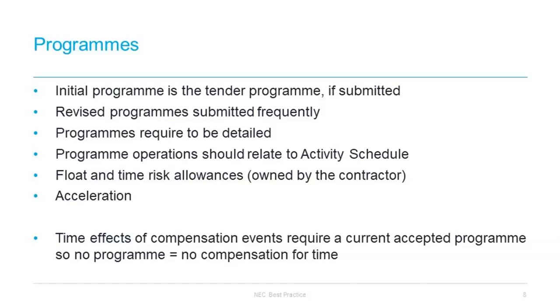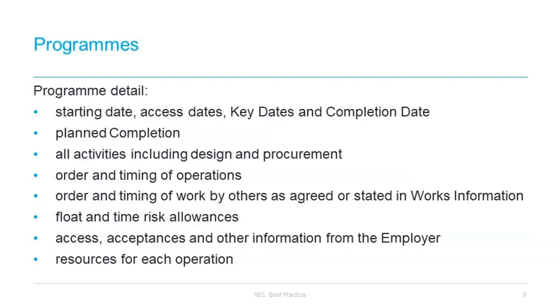And that's why we say recognising what your contract looks like and whether acceleration is at the contractor's option or not is quite important. And if you're a contractor, do not accelerate until the quotations that you've submitted have been accepted, or say no if you do not have the resources or do not have the ability to accelerate at all, and particularly say no if it is other issues that are causing the delay. If a contractor accelerates before the quotation has been given, and if there are other delaying events, that is really a recipe for those issues becoming intertwined and becoming very difficult to unravel.